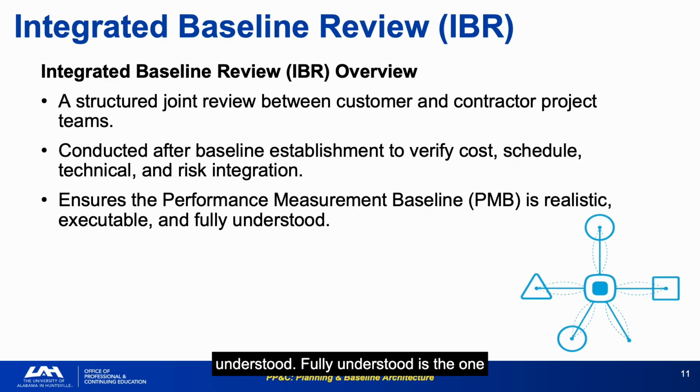Fully understood is the one that trips up programs. A technically correct PMB that the CAMs cannot explain is not a credible baseline. Integration is at the center of the IBR diagram for a reason. The IBR is not just checking individual elements. It is verifying that cost, schedule, technical, and risk are telling a single consistent story.